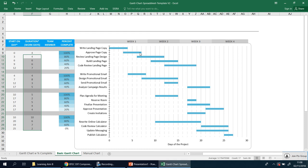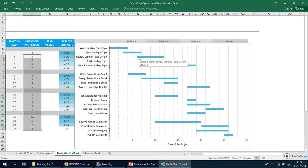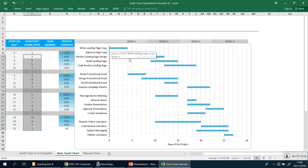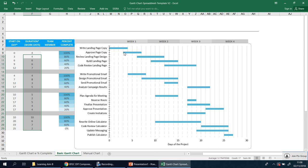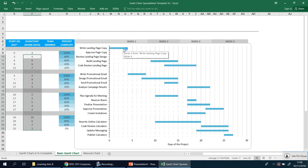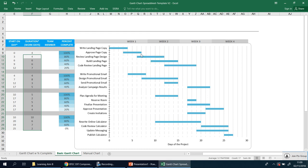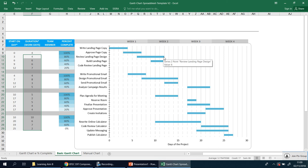What this does is it shows you if there's any overlapping. The overlap means that while this is finishing off you're starting this one. While this one is finishing off you're starting this one, so that makes sense now. You can see even though it's a four day task, this one's starting on the third day. So it's not going to be four and four making it eight, it's actually going to be four, five, six, seven—seven days. Makes sense? For those two tasks.